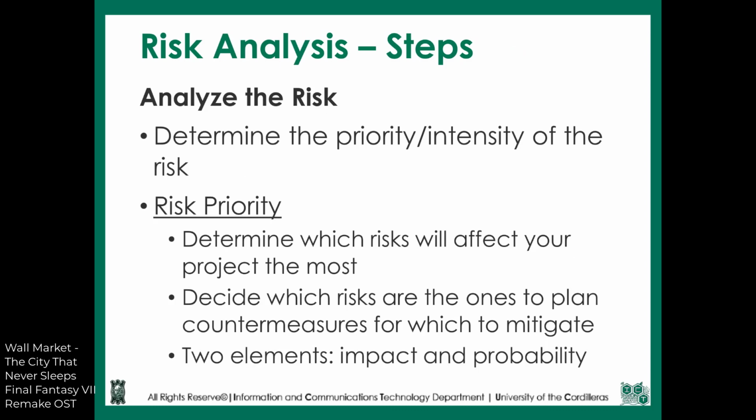To do risk analysis, there are some certain steps that must be undertaken. First is to analyze the risk by determining the risk priority. This will determine which risks will affect your project and which is necessary for mitigation and prevention techniques. In a project, there are a lot of risks, but that doesn't mean that all of those risks need to be addressed. For example, the positive risks that were stated earlier. There are also low-level risks that may not even happen or not affect the project significantly.